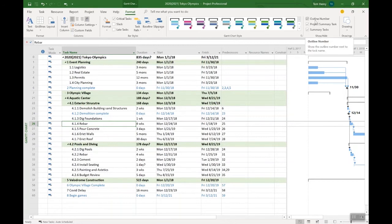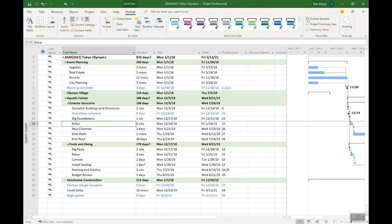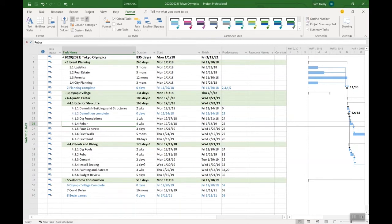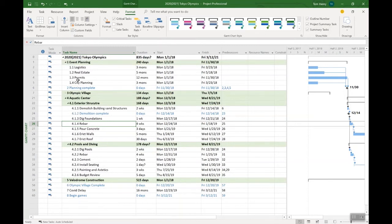So in Microsoft Project, all we need to do is click on the format ribbon. Top right-hand corner is the outline number. Click on that one, and it looks at the work breakdown structure based on your summary tasks and the indentations of the tasks within them, and it will number them for you. Pretty nice. That's the outline number.